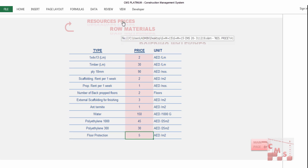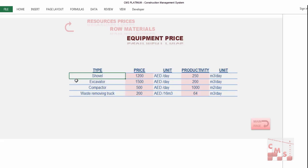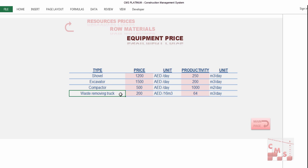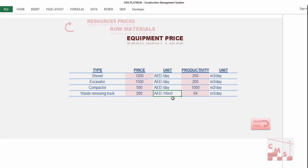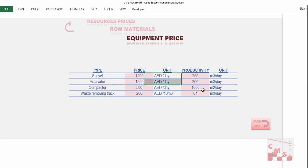For equipment, insert rental prices for common earthwork equipment: shovel per day, excavator per day, compactor per day, and trucks per trip (16 cubic meters per trip). Also provide productivity for each equipment type according to your soil conditions. The default productivities are common values but can be modified according to site conditions.